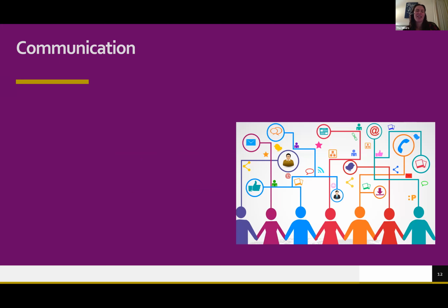All right, so communication. I just talked about transparency, so I kind of gave you a head start on this slide. But communication, as a project manager, really boils down to who needs to know what out of my stakeholders, when do they need to know it, and from whom. Sometimes I, as the project manager, am the person who should address that. 90% of the time, I'm the person who should be communicating. But 10% of the time, there's somebody else the information should come from. Certain decisions I want to come from the leadership team or my project sponsors. They shouldn't come from me.